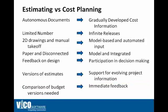There's quite a big difference between traditional estimating and 5D cost planning. Cost planning is much more dynamic — the project team has the flexibility to ask in-depth questions or what-if scenarios and see the impact immediately. A simple example: by adding more detailed information to one cost item, say 50 doors, it can be calculated more accurately by breaking it down per type and defining how much and what kind of labor is required for installation. That would be three tiers of information in the cost plan, which we will look at in a minute.